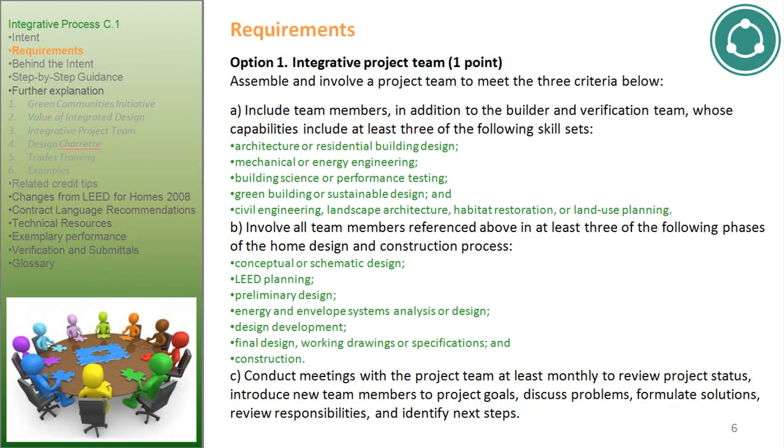Letter C. Conduct meetings with the project team at least monthly to review project status, introduce new team members to project goals, discuss problems, formulate solutions, review responsibilities, and identify next steps.